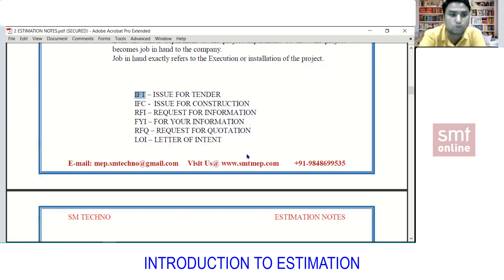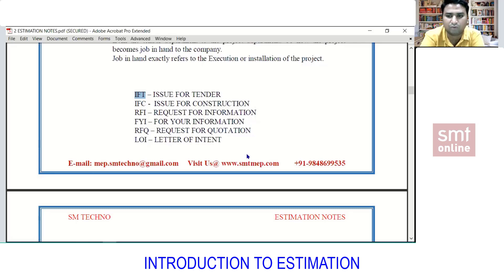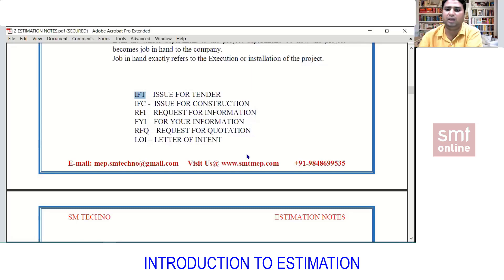But don't quote so high that you're out of the competition. When we win the project, the client issues a Letter of Intent on their letterhead confirming the award — mentioning the company name, the services, such as HVAC or plumbing and firefighting, and the agreed cost. Both parties sign it: one copy for us and a fax to them. The Letter of Intent is a written confirmation that you have won the project, with the price clearly mentioned.